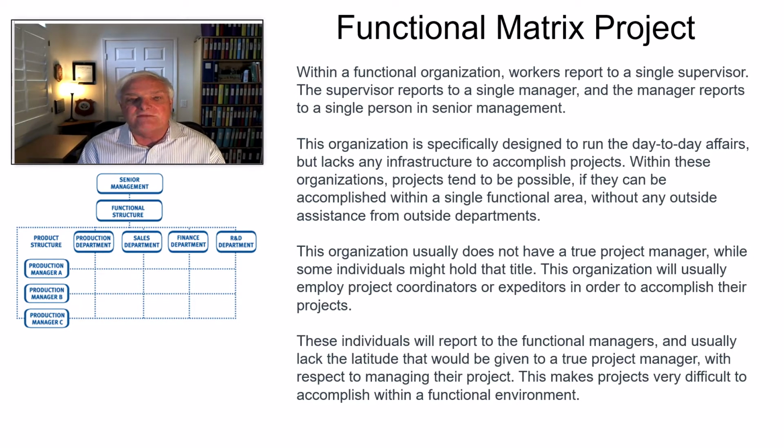So you could have a functional manager who's in charge of all of the engineers, another one that's in charge of all the analysts, another one that's in charge of your manufacturing representatives, and another one in charge of your quality representatives. And what they would do is they would go ahead and basically allocate to you a specific person. That person would not be assigned formally to the team. They would be streamlined to you when you need them.